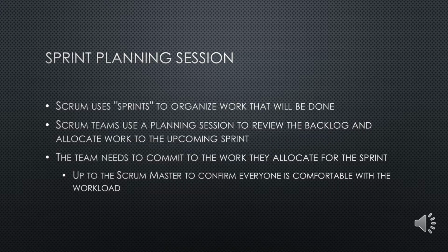Sprint planning sessions are meetings where everyone on the sprint team, and sometimes other stakeholders, discuss and plan the next upcoming sprint for a project. As stated before, sprints are simply intervals of time, such as 2 weeks, 3 weeks, or even a month, where the teams will allocate a certain amount of work. This work is taken directly from the product backlog.